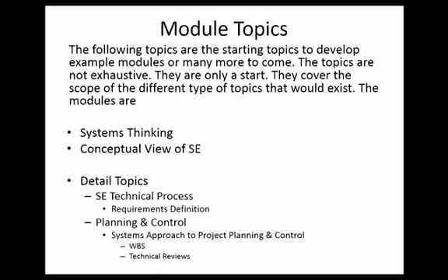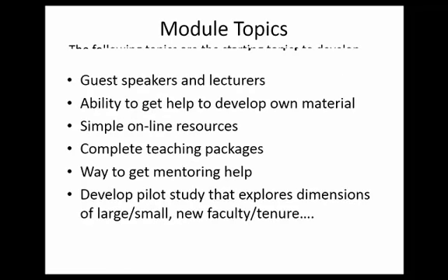And then under planning and control, we said a systems approach to project planning and control. We initially just had project planning and control, but I think it was Rick who brought out the point that we're not talking about just traditional project management. We're talking about work breakdown structure that's driven by the design and realizing, okay, we have these subsystems, this one has this complexity, that means I'm going to need to build this into my schedule. So that's why we added that systems approach to the planning and control. So those are our modules, our vision and the key topics.